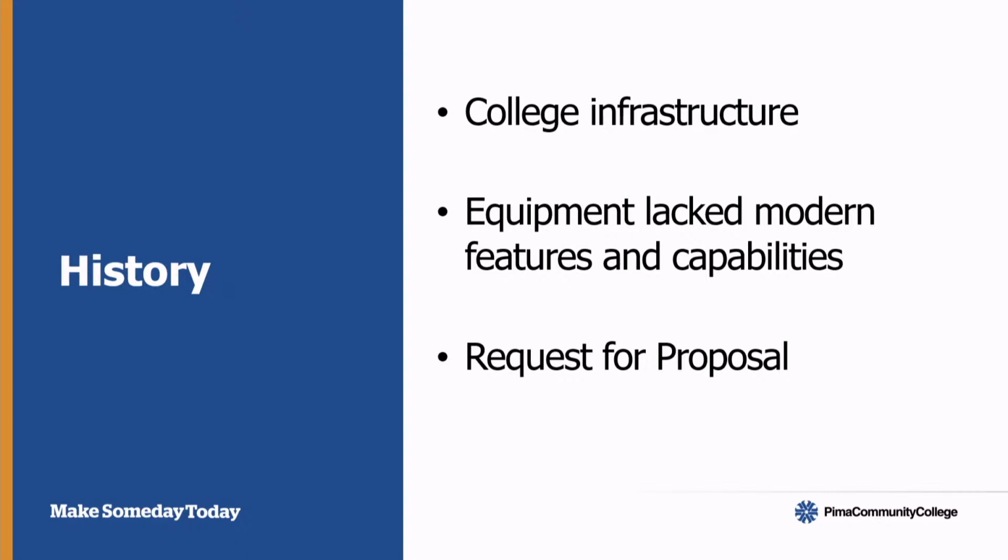Trane then came on, kicked off the project by initially assessing where we were at, going through a comprehensive audit of our systems, controls, and energy savings opportunities that we might be able to take advantage of, and then put together a proposed list of projects that they would recommend that we put in place. That was then approved by the board in late 2020, and that kicks off what Benny's going to update you on, from the 2020 point to now, what has happened, because we are just about finished with that project and finally commissioning the project at the conclusion of all of that work.